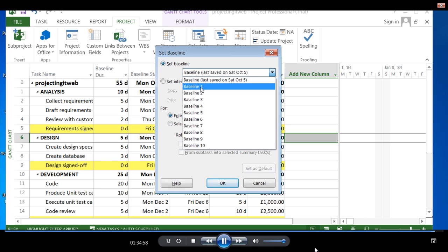Move whatever there is in baseline to the next increment available and make current changes in the baseline. The reason behind that is the formulas, the reports, the variance calculation, it all uses baseline as the lookup table. Yeah, so you got to go and check, make sure that you use baselines only. This is how you do it.